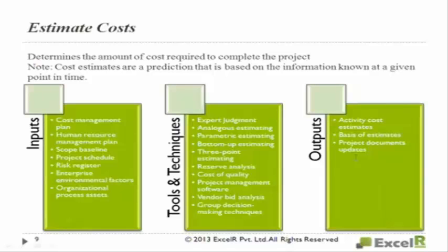If you can recall, for risks, basically you keep these reserves for some risks. What if it rains? I have to take a taxi. It's a contingency you keep. Normally you go by bus or normally you go on a cycle. What if it rains? Let me keep another $10 extra as a contingency to address that risk called rain. You will go by taxi. That is called contingency reserve. You know that it may rain. So it's a known unknown. Management reserve is unknown unknowns.